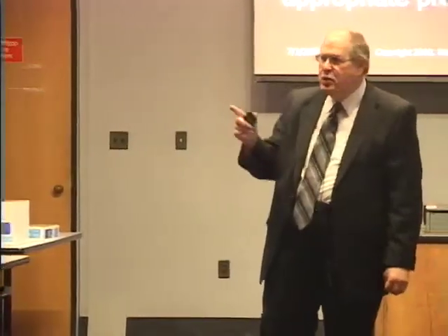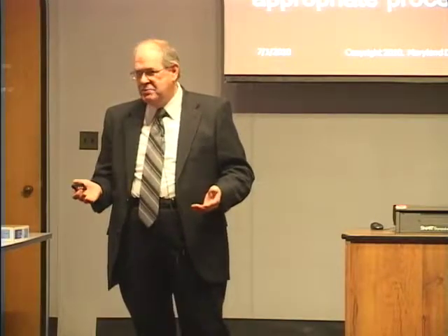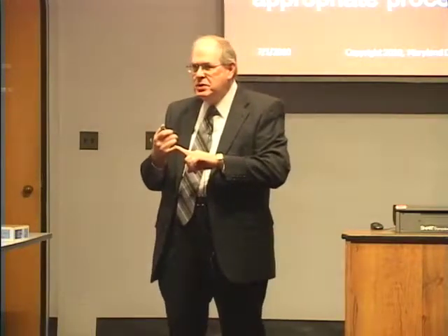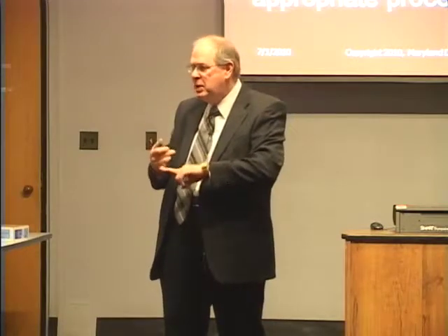Well, we cover that in the planning class. And I will say, if you're in specifications, may and shall don't mean the same thing. If you may do something versus shall do something, that is a huge difference. What we say in planning is "may" should only be used if it is talking about something the state might do or might not do. But obviously, if it's a requirement for a vendor to do, then you're using must or shall or is to or something like that. As a requirement, may doesn't cut it.